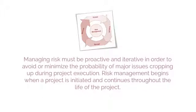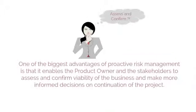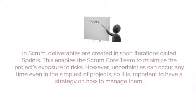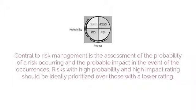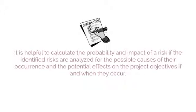Managing risk must be proactive and iterative in order to avoid or minimize the probability of major issues cropping up during project execution. Risk management begins when a project is initiated and continues throughout the life of the project. One of the biggest advantages of proactive risk management is that it enables the product owner and the stakeholders to assess and confirm viability of the business and make more informed decisions on continuation of a project. In Scrum, deliverables are created in short iterations called sprints, which enables the Scrum core team to minimize the project's exposure to risks. Central to risk management is the assessment of the probability of a risk occurring and the probable impact in the event of occurrence. Risks with high probability and high impact rating should be ideally prioritized over those with a lower rating.